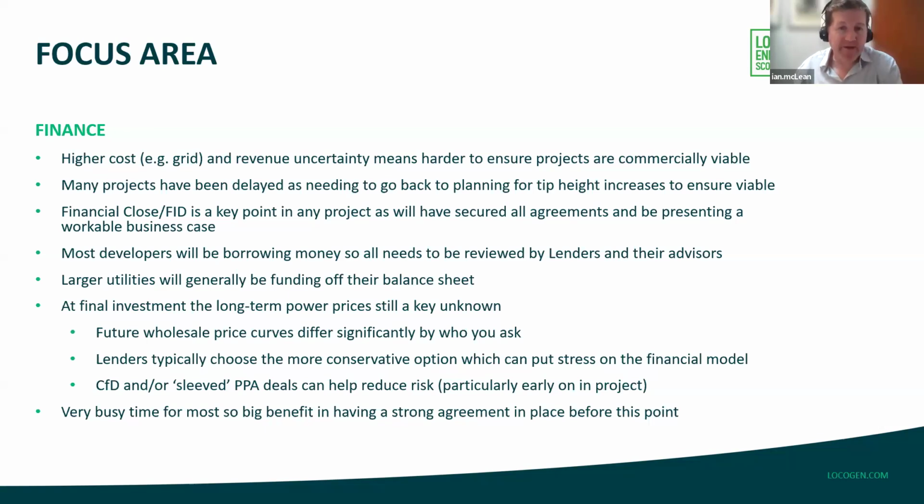But that does also mean that many projects have been delayed as they have gone back into planning to get a tip height increase, to look to offset the more significant cost uncertainty and also the move from manufacturers away from smaller machines.